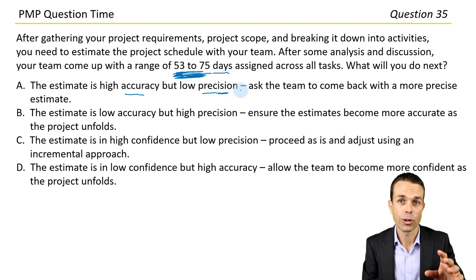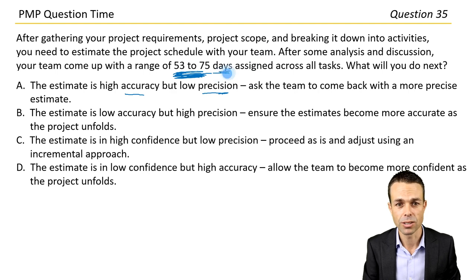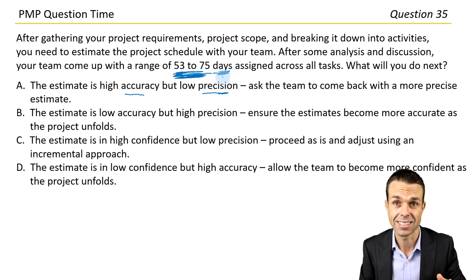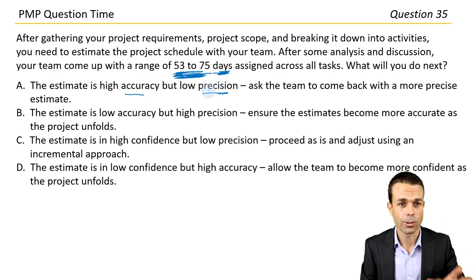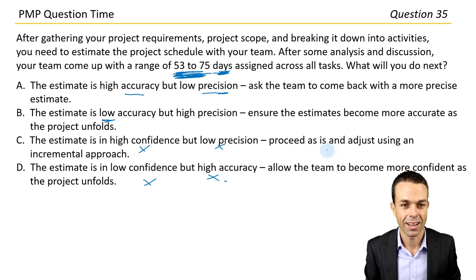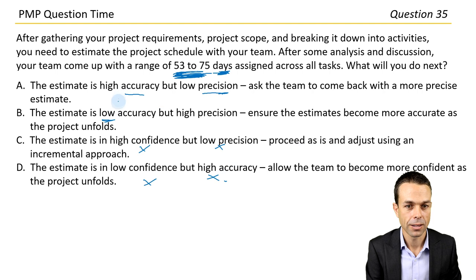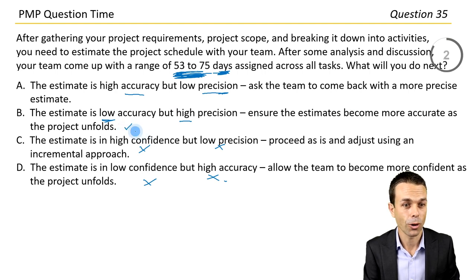Precision is more about how exact it is — is it sometime next week or is it a specific day, like Wednesday, in days or hours or minutes. The precision here is pretty good: we're saying it's a specific number of days, not sometime between now and November. So we have low accuracy and high precision. Options mentioning 'confidence and precision' are not real combinations — those are red herrings. Low accuracy and high precision means we should ensure the estimates become more accurate as the project unfolds. Answer B.